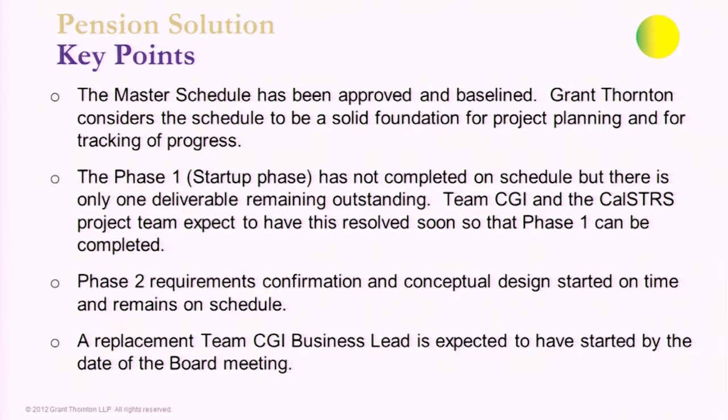We think it's a pretty solid foundation for the project to plan on and to track progress, and we'll be monitoring the project's progress against that schedule. We think all the necessary activities are there, dependencies have been identified, the durations are reasonable, and the resources necessary to execute those activities have been considered. So we think it's a pretty good schedule for starting the work.